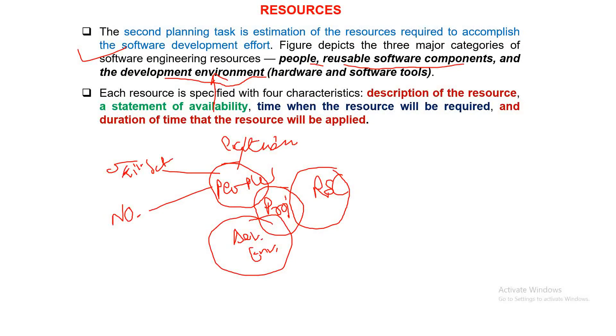The experience and skill set needed must be identified. You cannot go ahead with a software development project using all freshers — you definitely need some experience. But you also cannot go with all experienced people because the budget will overshoot. So you need a proper balance between expert programmers, good programmers, and freshers — a proper combination with clearly identified numbers.